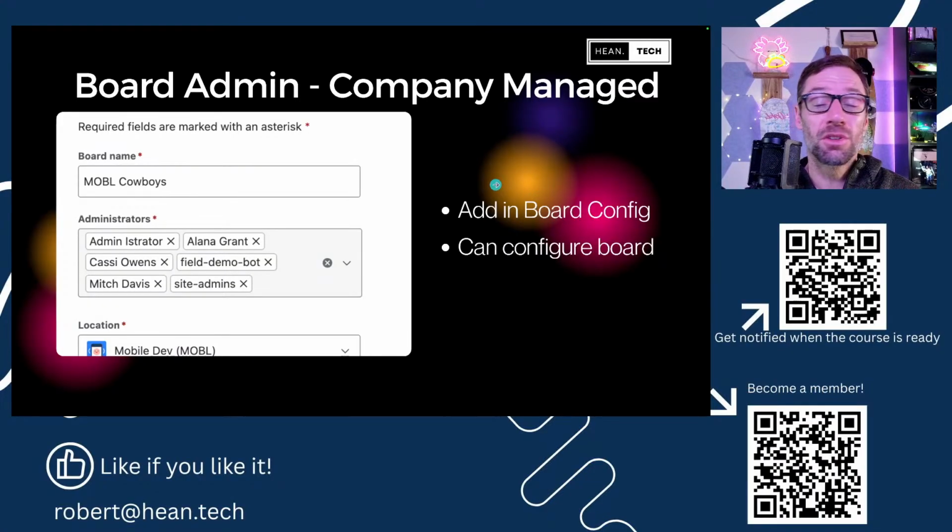Part of that is to make sure the team doesn't get surprised by changes. The last thing you want is for your development team or the team doing the work to be surprised that there's a new column or that the statuses have been mapped differently or that there's a whole new board, these kinds of things. Now, these board permissions are unique per board. So if your project has multiple boards, you'd have to come in and tweak each board's list of admins as you go.